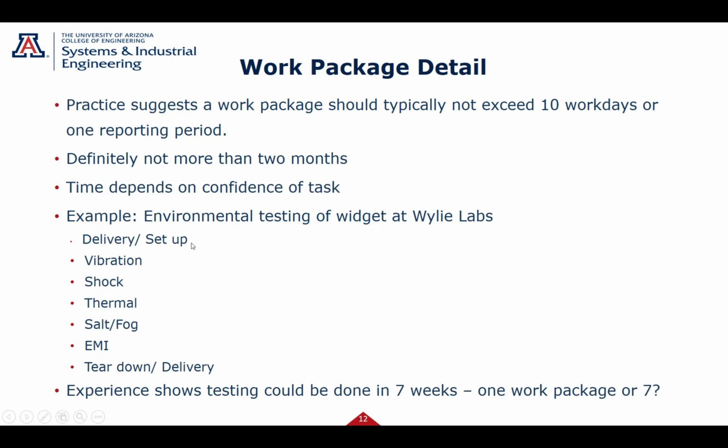I need to deliver my product to the labs and set it up. I might want to do vibration tests, shock tests, thermal tests, salt fog, electromagnetic interference tests. I might have a group of tests. And I might have a teardown and delivery. So, you've done this before on boxes. Let's again say this is the radar box. Doesn't matter, but you've done this before and it's typically 7 weeks.